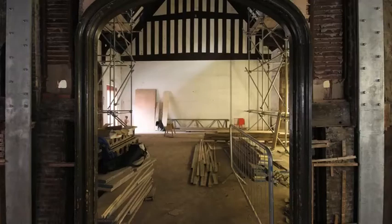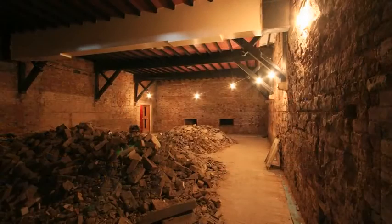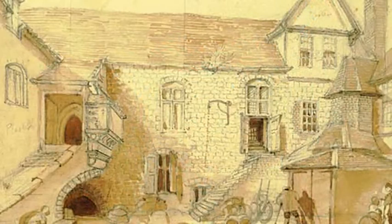The consequence of the geology has been a significant amount of underpinning, particularly on Vaughn's Mansion, in order to support the actual structure. This has had to be completed in a sympathetic way so we don't actually damage the historical structure, but we also provide that structural integrity which is so important. That has resulted in quite significantly difficult solutions that have taken a long period of time, but we're pleased to say that we've managed to overcome all the difficulties and Vaughn's is now in a fit state.